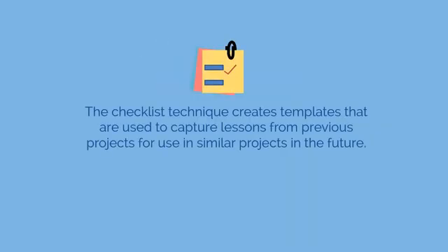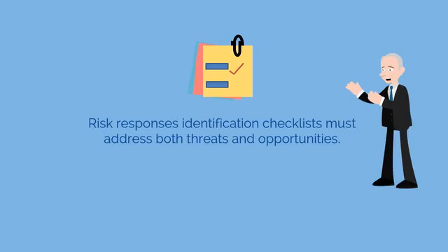Next, let's look at checklists. The checklist technique creates templates that are used to capture lessons from previous projects for use in similar projects in the future. Risk responses identification checklists must address both threats and opportunities.